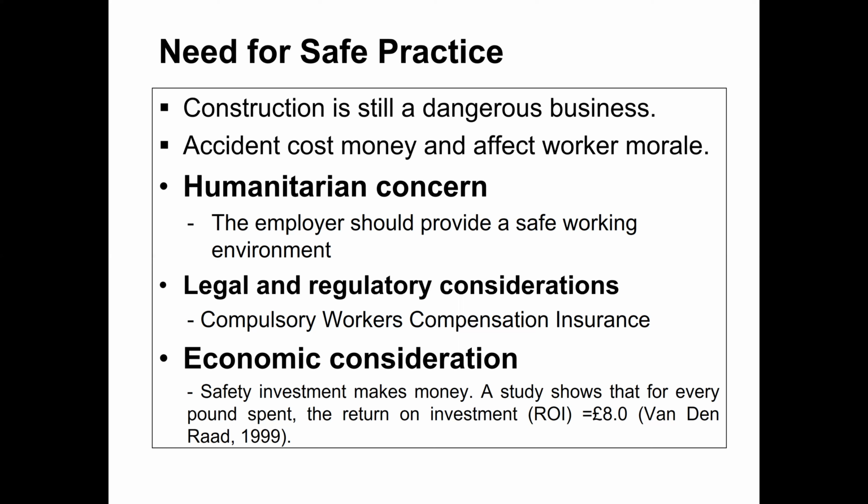Third concern for safe practices is the economic considerations. This is most important. Safety investment makes money. There are a lot of studies showing that if we invest in safety, safety investment makes money. A study shows that for every pound spent, the return on investment is 8 pounds. They have done a study in the UK.